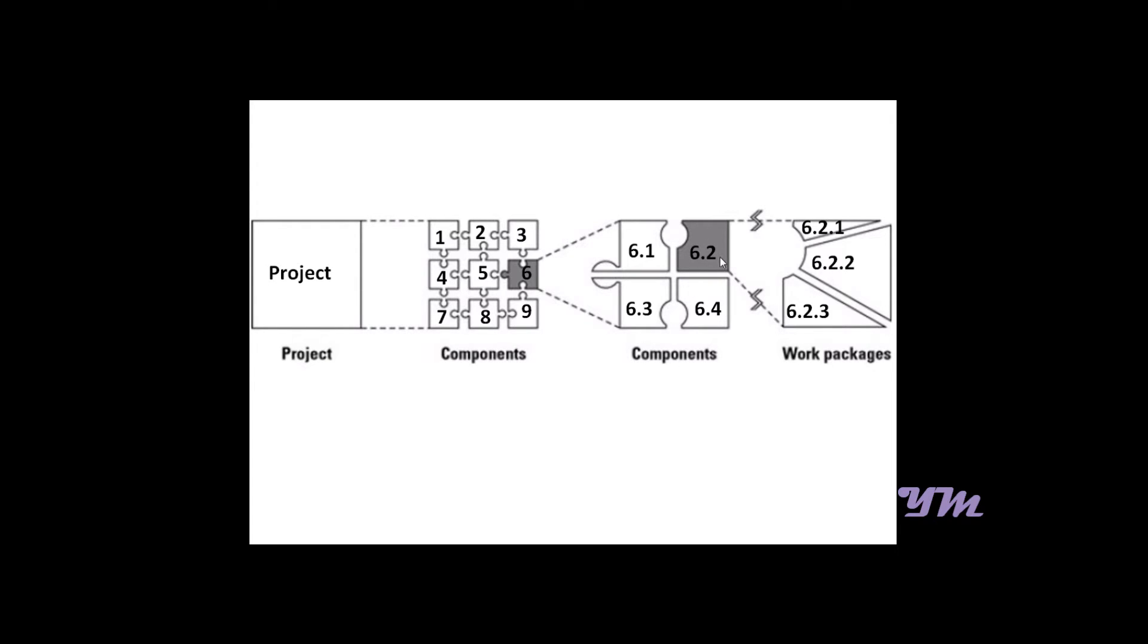And this component 6.2 is divided into three work packages: 6.2.1, 6.2.2, and 6.2.3. So this is basically the structure of WBS, that is Work Breakdown Structure.